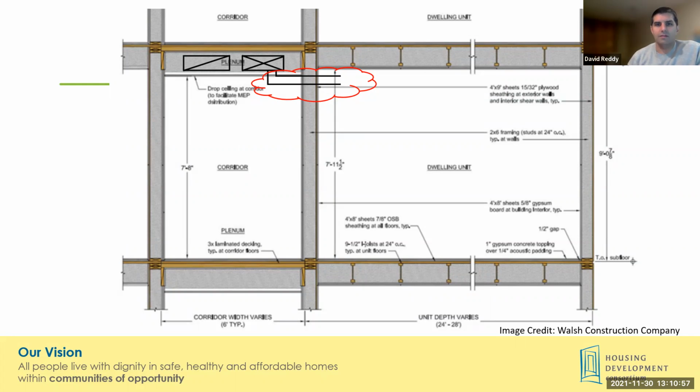So these are just the kinds of things that hopefully, with the entire team at the table early on, drawing, sketching, thinking about how it's going to be integrated, a solution to this could be developed earlier. Another thing that came up on the same project was a beam crossing the corridor that these trunk ducts could not penetrate. So those considerations are just a good example of the coordination the entire team can work on early on.